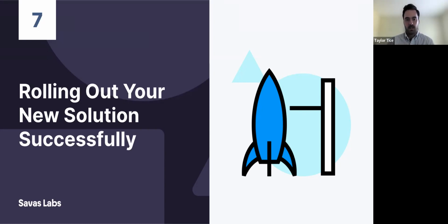So a good training and rollout plan, the foundation for that is laid in the planning phase, where you define your requirements and specifications of what this new custom piece of technology is going to do. And really from there, you take that and communicate to stakeholders and users what the technology does, as well as what it doesn't do. And that's an important piece not to be overlooked.